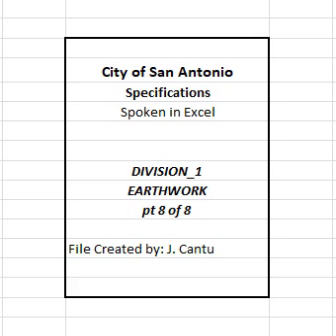109.5 Measurement. A. Cement. Cement will be measured by the ton, dry weight. When cement is furnished in trucks, the weight of cement will be determined on certified scales, or the contractor must provide a set of standard platform truck scales at a location approved by the engineer.